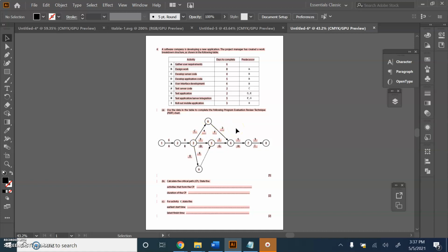Does that make sense? Now let's follow this path here. E all the way through to this node, 6. E and G take 8 weeks to complete. We need those 8 weeks. We can't make that any shorter. So the critical path at the moment is A to B to E to G. Okay? We need those 8 weeks. We can't make it 6 weeks or less. Okay? We can delay C and F because they only need 6 weeks to reach point 6.